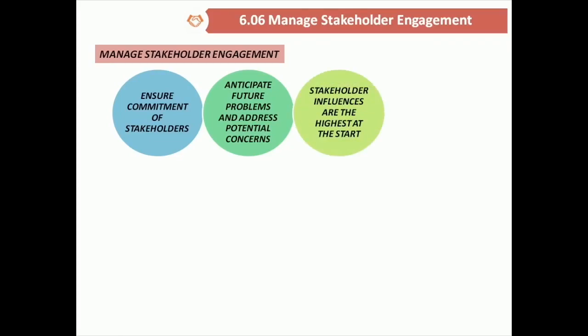It's important to note that the stakeholders' influence is the highest at the start of the project, and as the project progresses, the influence continues to reduce. The project sponsor's assistance is to be taken by the project manager whenever required. It's very helpful for the overall project development.